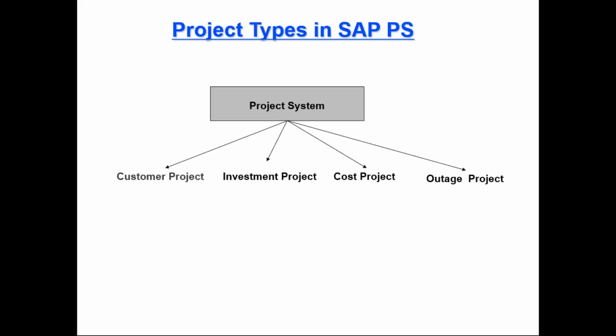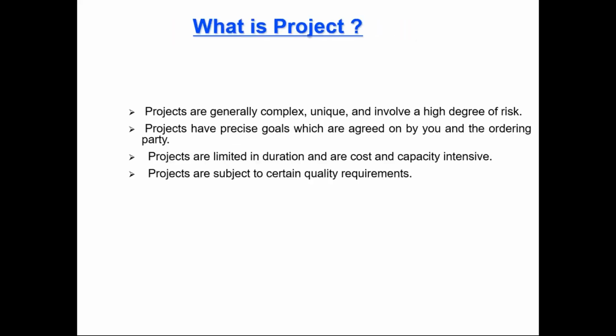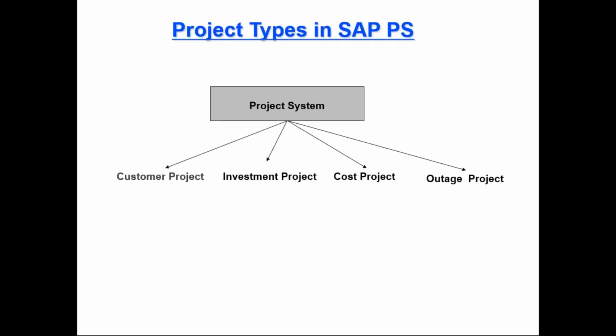All these things have to be mentioned in this document, and when it is signed, we call it that the project has started formally. If you know, whenever we say the kick-off meeting is going to start, generally that is the time when we float all the requirements, and when we say this is my project charter, formally we have signed it. Generally it happens, but it can be different also. So a project will have all these characteristics, and how can we segregate projects into different types?